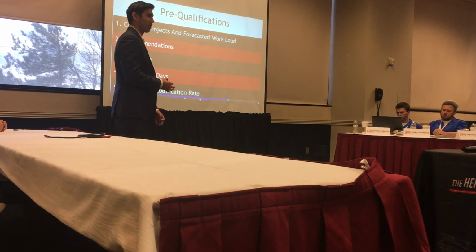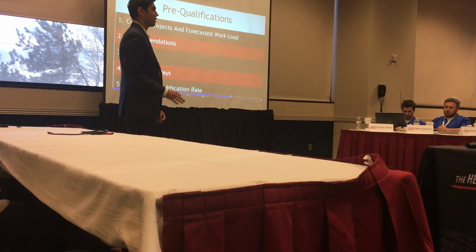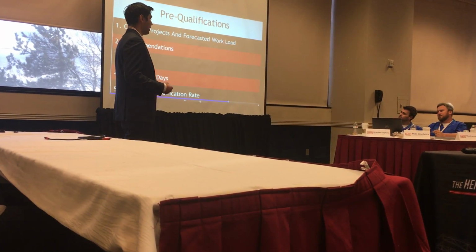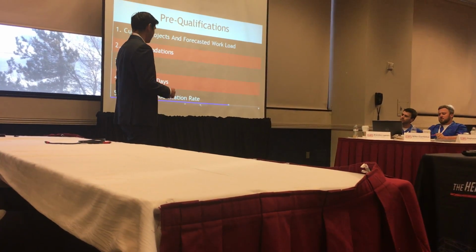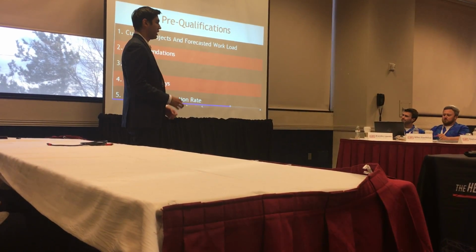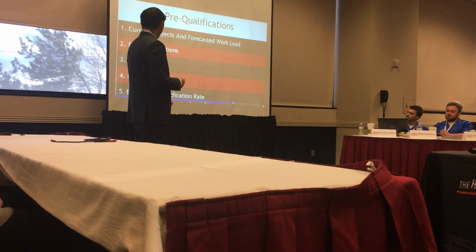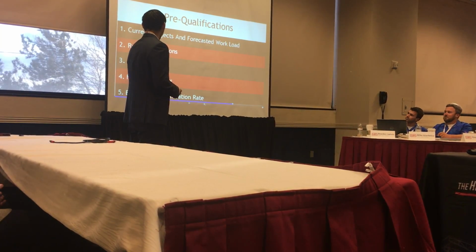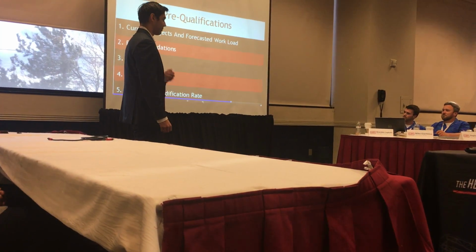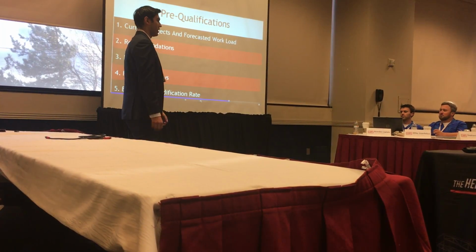I just wanted to go over a few quick points that we're going to look at specifically for this project. First, we want to take a look at their current and future workflow. The reason for this is we want to make sure they can handle the project and that they don't overwork themselves. Second, recommendations. We're going to look at their current jobs and contact the references they gave us, to see how they are to work with and get a good idea before we decide to choose them.